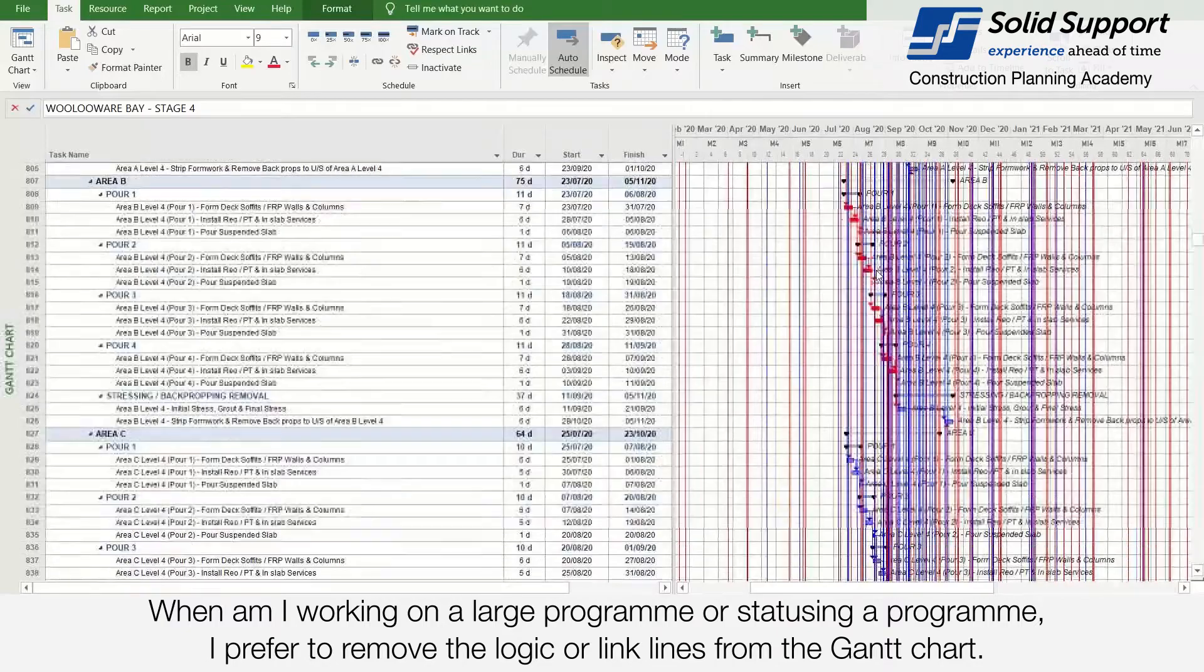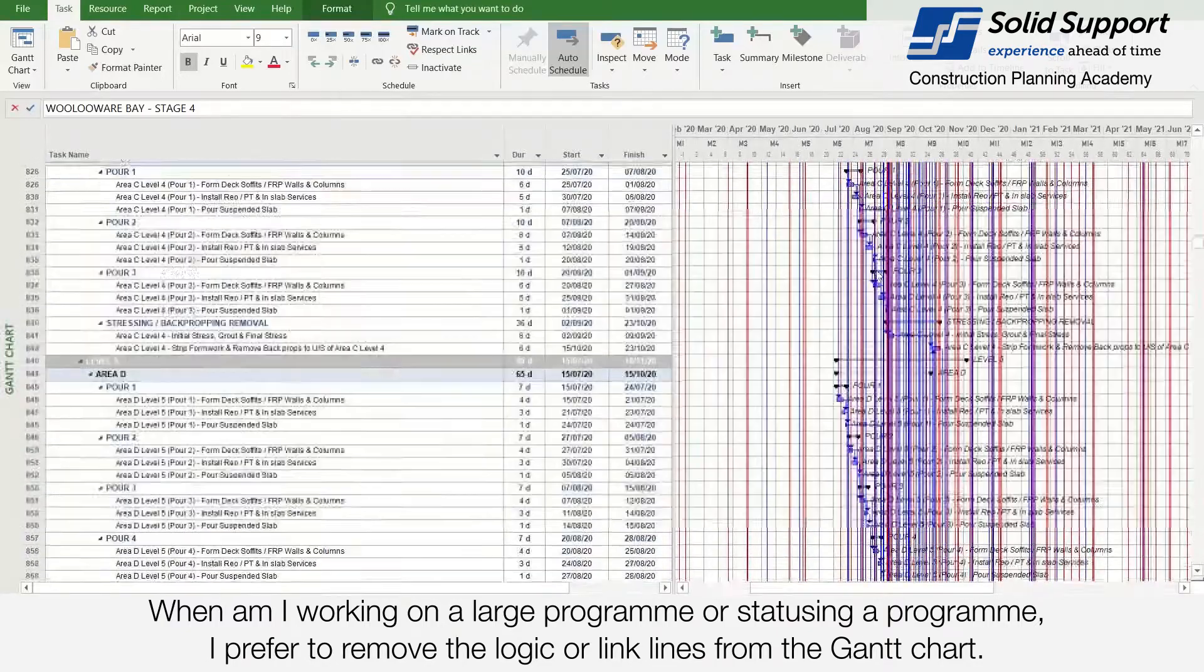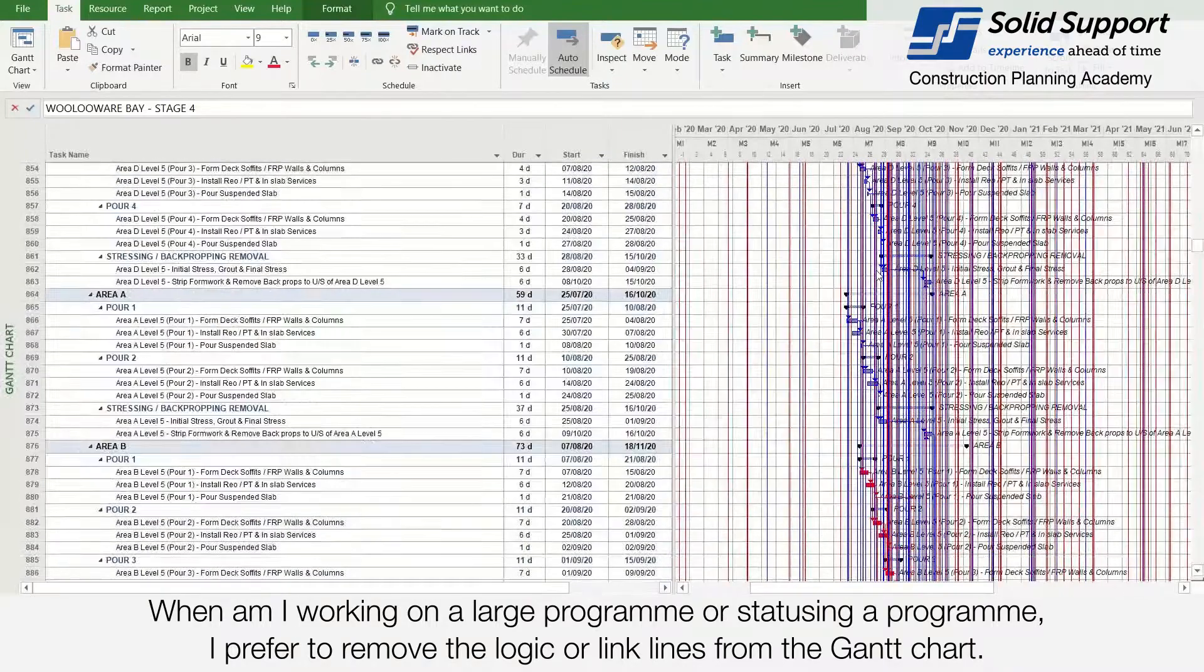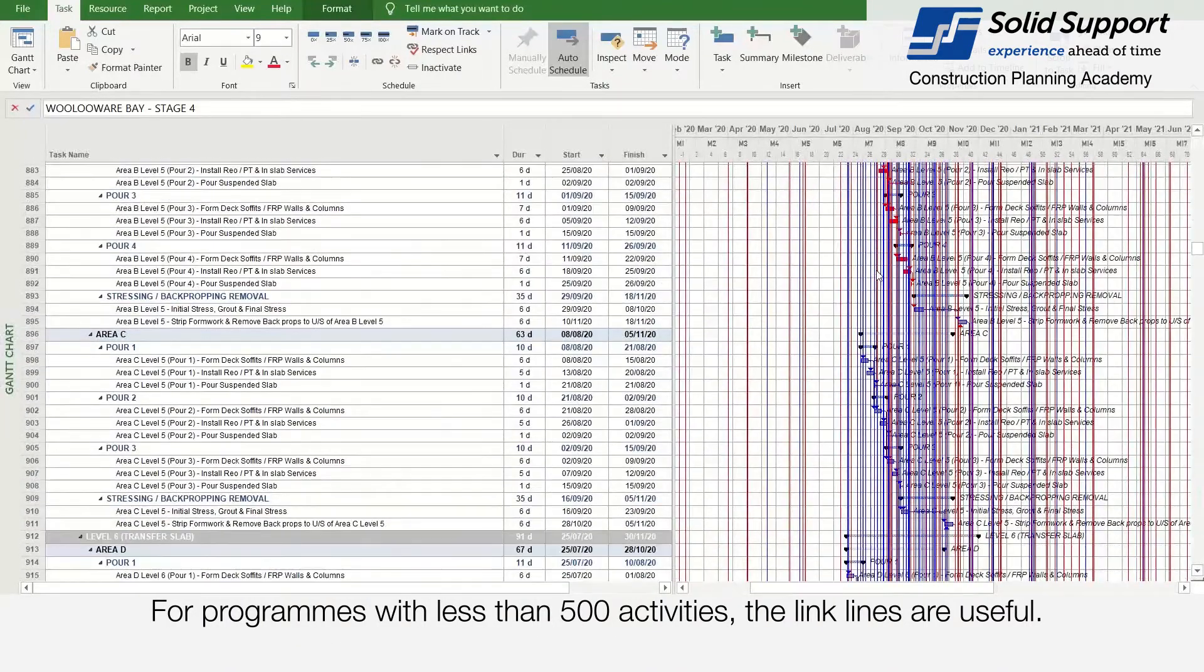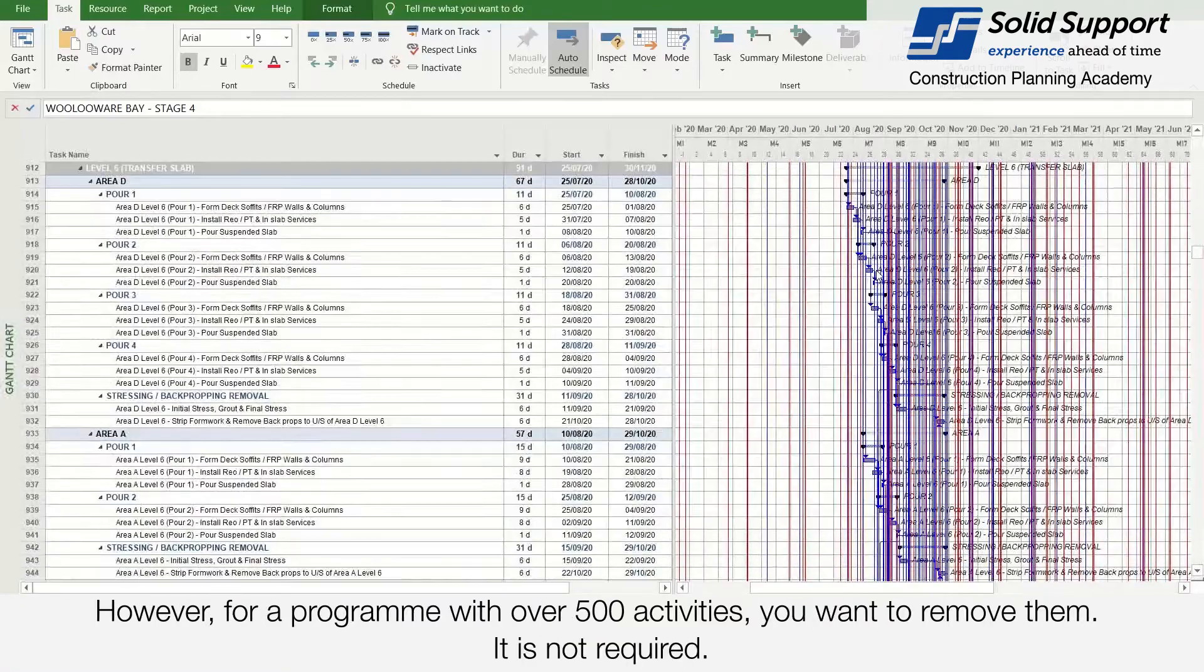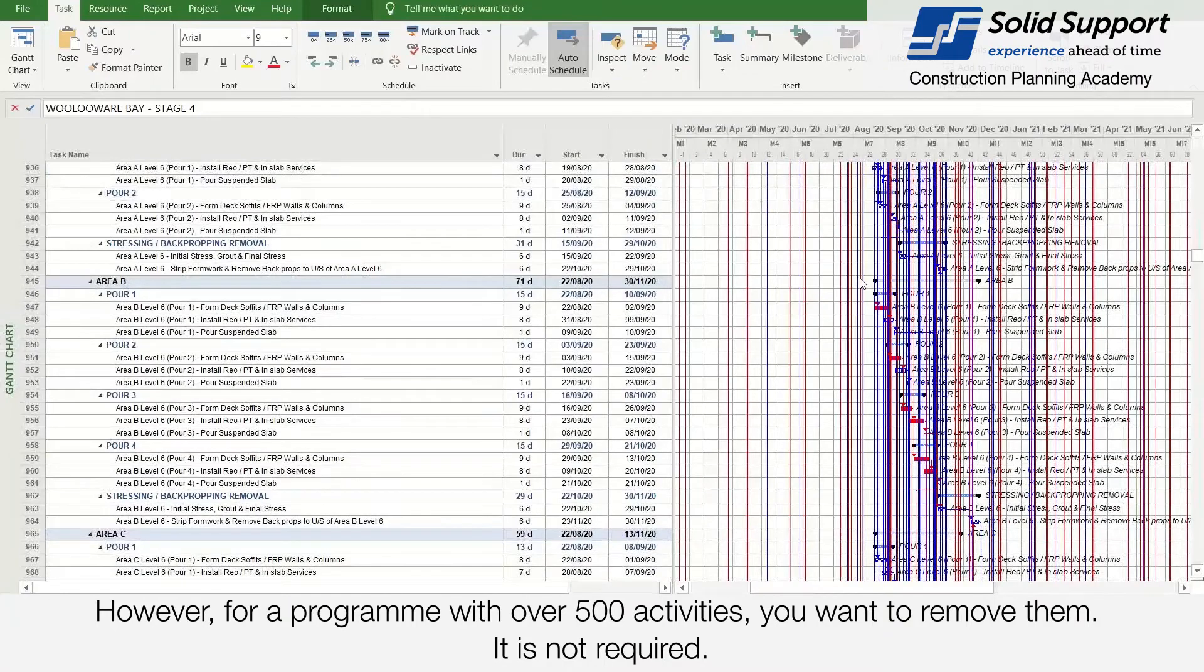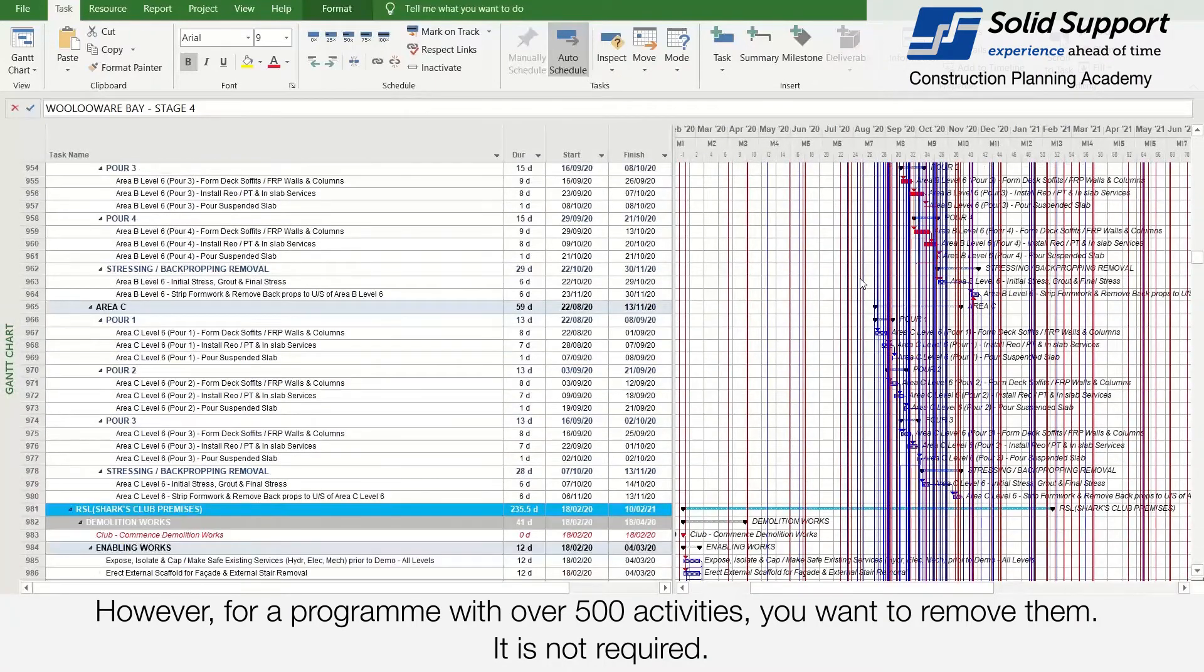When I'm working on a large program or statusing a program, I prefer to remove the logic or link lines from the Gantt chart. For programs with less than 500 activities, the link lines are useful. However, for programs with over 500 activities, you want to remove them. It is not required.